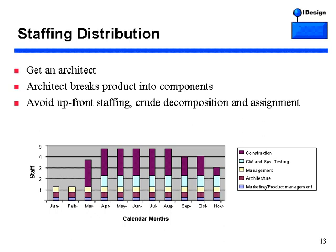Let's look at staffing distribution — how do you distribute your staff and firepower over the duration of the project? The team should be comprised of a core team — a project manager, a product manager, and an architect — plus developers and QA resources. The core team stays throughout the lifespan of the project. This is from an actual project I managed a few years ago. The manager, product manager, and architect were all on board on day one.